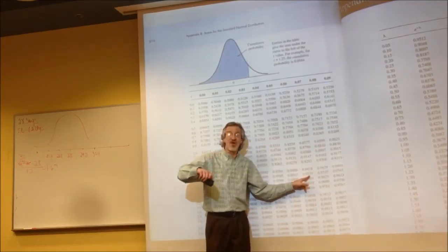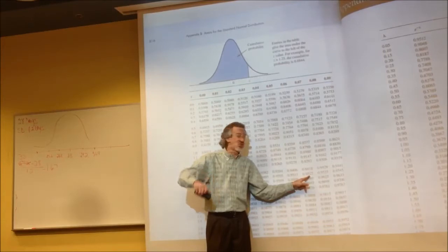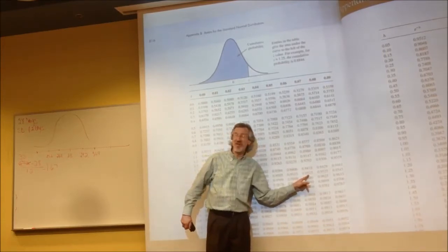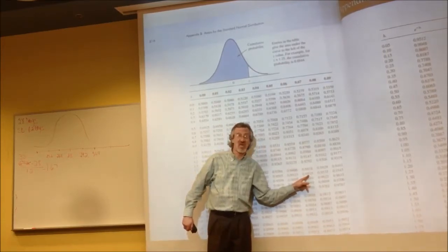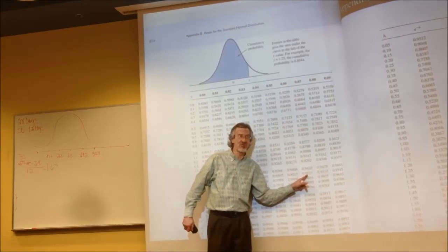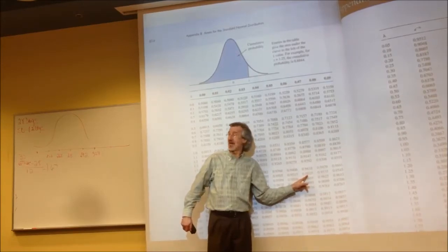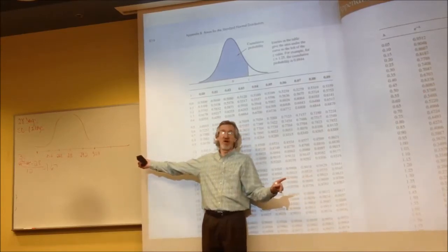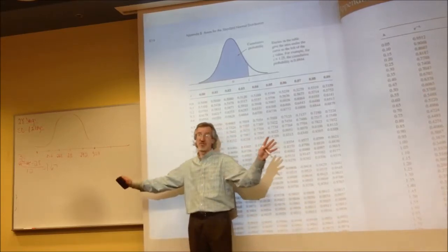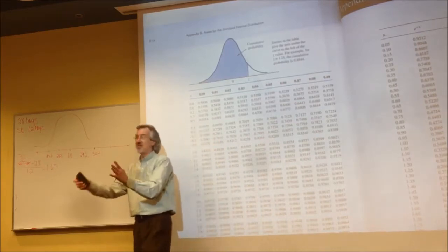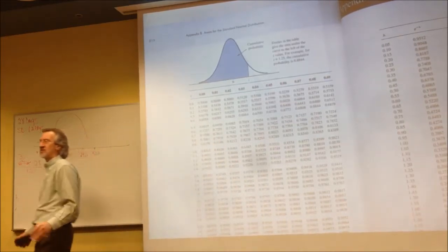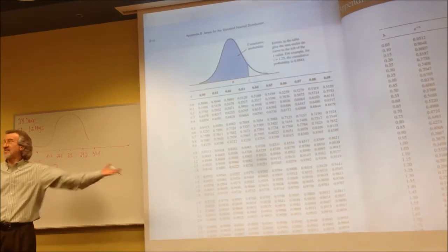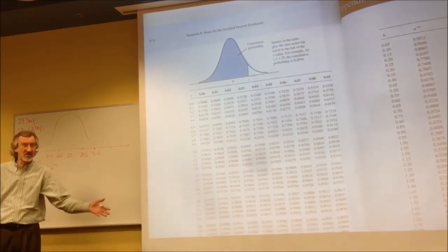I've now set myself up for only about a 4.75% chance of disaster, meaning it's going to take longer than 30 days. And I like that much better, feel much more comfortable. I'm so glad we negotiated this far enough in advance that everything could be worked out. This could be weeks or whatever, where that is significant, or months even. That's very significant. And that's where this really helps you, in the planning stages.